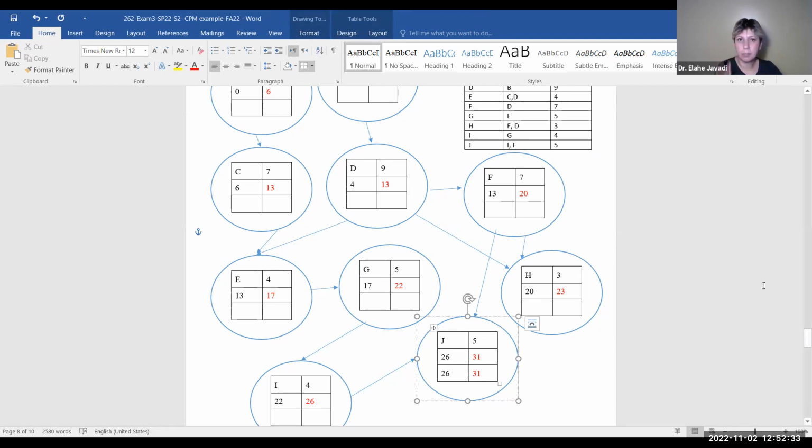We're going to set those numbers for late finish and late start of the last task. And then we're going to go back one task at a time. We identify late finish by looking at the late start of what comes after it, taking the smaller number, because that's the latest the task after this one can start, and your current task, that's the latest it can finish.